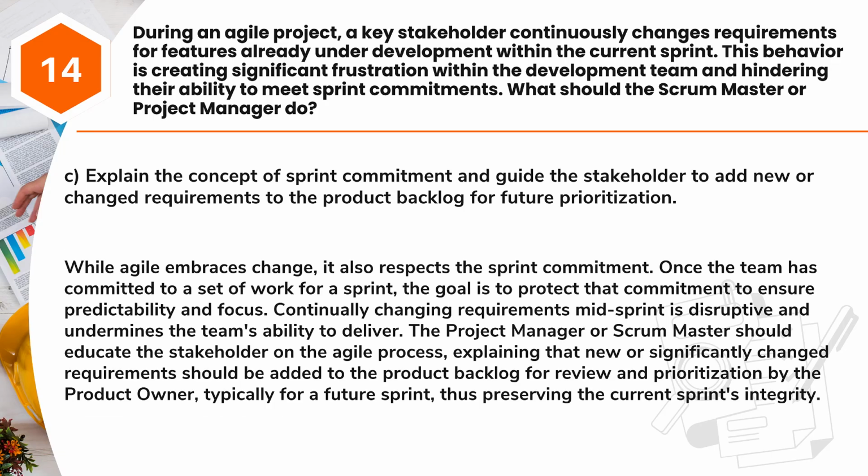Answer: C. Explain the concept of sprint commitment and guide the stakeholder to add new or changed requirements to the product backlog for future prioritization. While Agile embraces change, it also respects the sprint commitment. Once the team has committed to a set of work for a sprint, the goal is to protect that commitment to ensure predictability and focus.